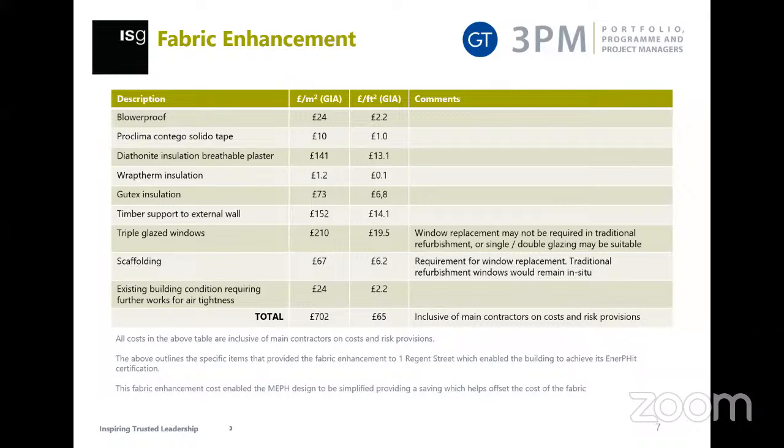minimised. And if there were solutions to be made on overlap of different elements, that was worked through at workshops with the architect and the consultants to make sure that at each stage we qualified it, we tested it, we signed it off, and gradually worked through those design elements, as well as the triple glazed windows, which in effect